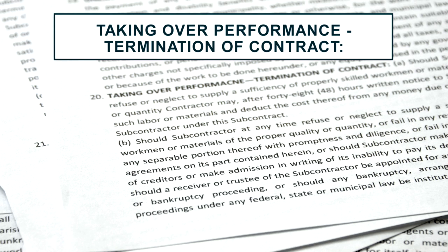Taking over performance and termination of the contract. Let's hope this never happens. But if you're given a 48-hour notice by this contract, many contractors make it a 72-hour notice.